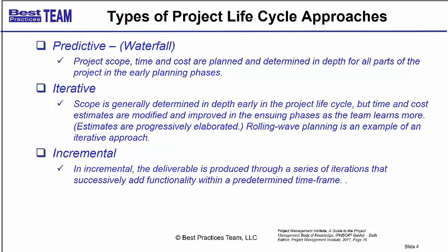Another version of an iterative life cycle is incremental. So this is just another flavor of iterative. We're dividing the project up into iterations, but as we move from iteration to iteration, we're adding on additional scope requirements or just building out more functionality in each new iteration.